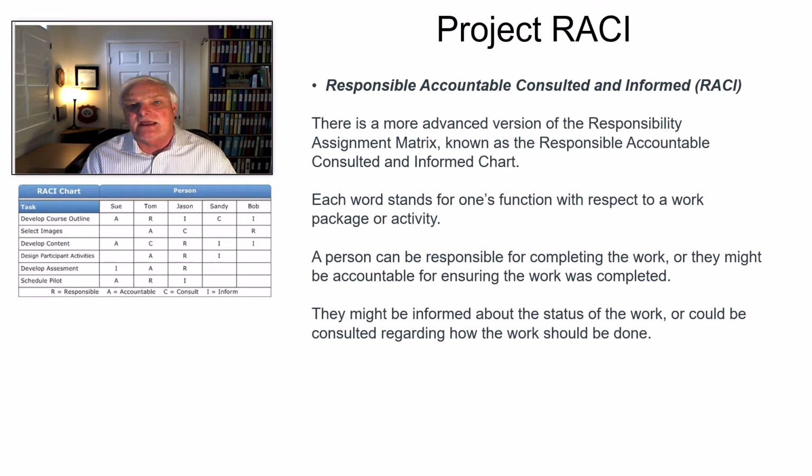Okay, and remember that the RAM typically does not have individual names in it. And the reason for that is because you have another form called a RACI, R-A-C-I, which is the Responsible, Accountable, Consultant and Informed chart. And this is where we actually take that same type of philosophy. What are the components that are responsible for being completed on a project? So if you take a look at the RACI chart that we've got here, you've kind of taken that WBS, that work breakdown structure, and you've taken all of the elements of it.